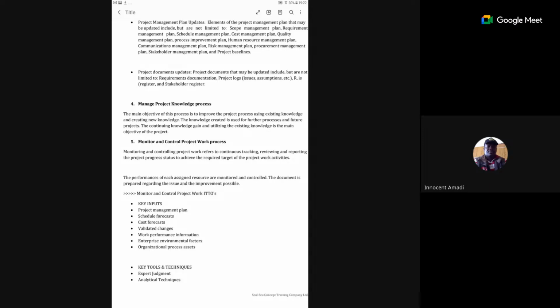If you can do a retrospect meeting with your project team, the retrospect meeting will tell us, during the course of this particular phase, let's say what we have just done is laying the foundation of the house. Before we move to the next phase, we have to think about things that went wrong, things that we could have done better that we didn't. A lot of things that we did not account for that occurred in the process of laying the foundation of the building. I'm just using that as an example. It might be a phase.